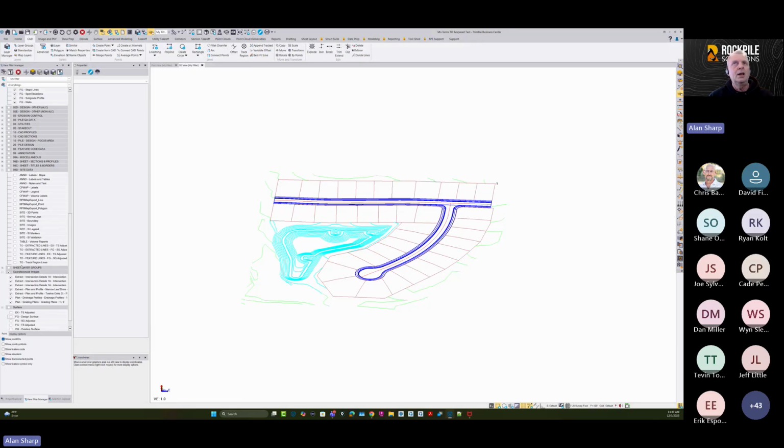So if you want to go in and edit the subgrade models, or delete a line from a subgrade model, or add a line to a subgrade model, you've got all the raw data that built that subgrade model and you can modify and edit it. So if you're doing overbuilds or over X's to the subgrade, you can apply those directly to the subgrade line work and then add it to your model, and now you've got a subgrade adjusted with overbuilds built in. So this gives us a lot of flexibility in terms of building the surfaces, building the subgrade models, and turning it into whatever takeoff calculations you want to do.